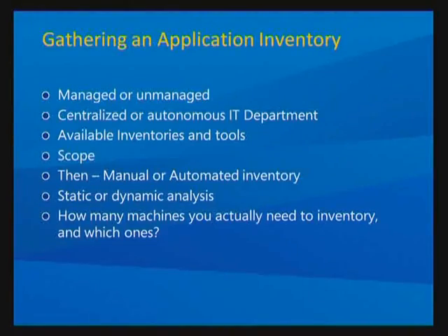The next thing is, how many inventories do you actually need to inventory? Again, if you're a well-managed environment, whether you're central or decentralized, you can usually pick a group of desktops to work with. If you're an unmanaged environment, then you're going to need to assess all of your machines. I ran the assessment on about 4 machines in Microsoft, and I came up with over 1,200 applications on 4 machines. So if you multiply that out in an environment that is so unmanaged like Microsoft is, you'll find that you do have far more applications than you actually ever thought you knew about.